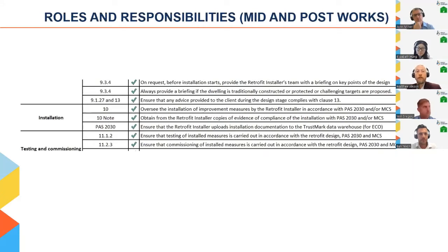One gripe aimed at PAS 2035 is how it can inflate costs. At Bailey Garner, we've used practical site experience to review key areas where cost savings might be found in the works and design. Specifying a thinner profile insulation might avoid cost in having to extend a projecting protective roof required for PAS 2035 compliance. Evaluation of the temperature factor of the ground floor junction can determine the need to extend EWI to the footings or not.